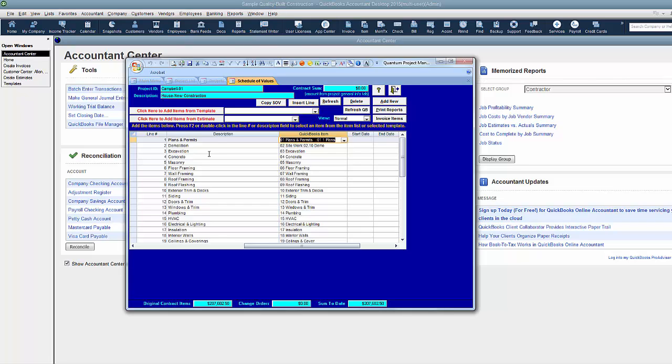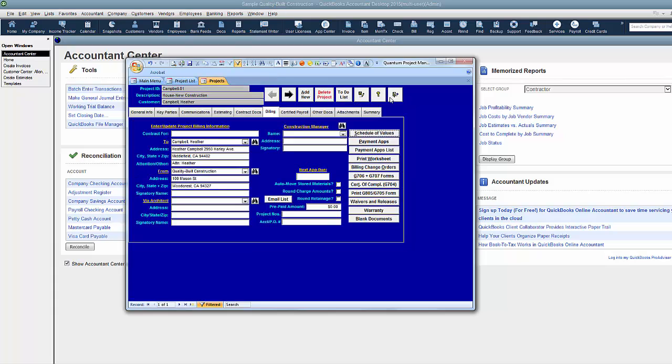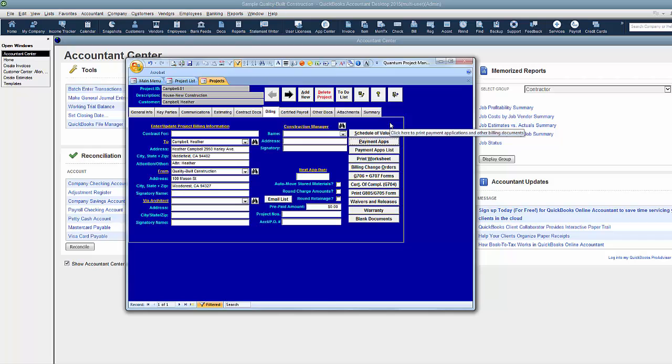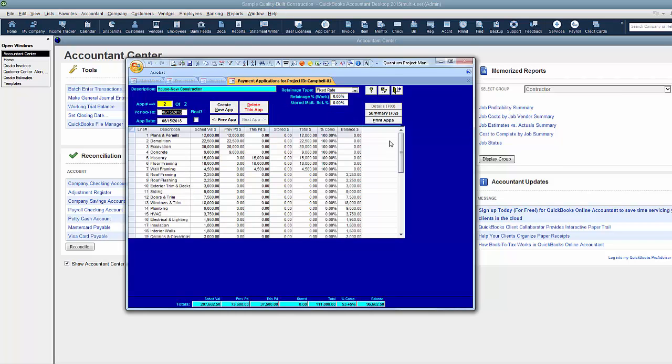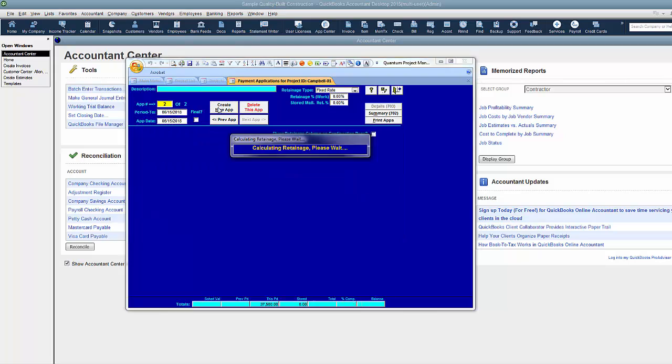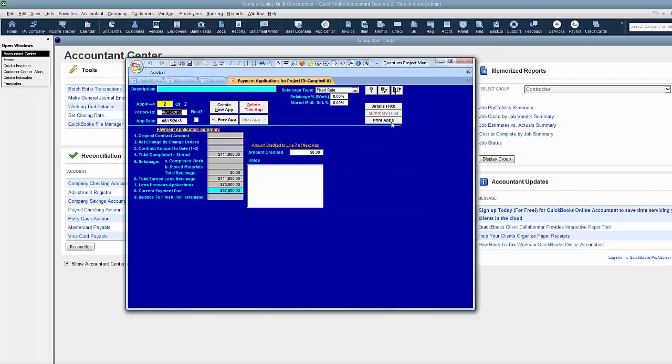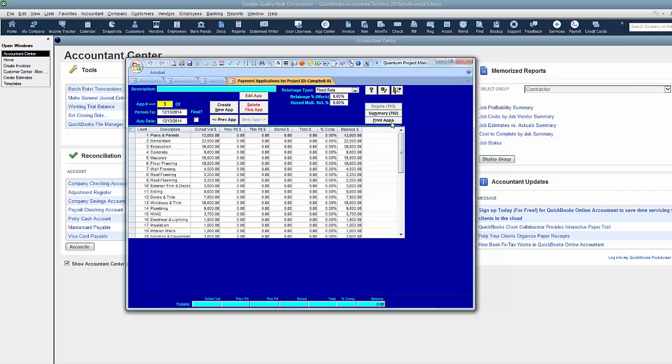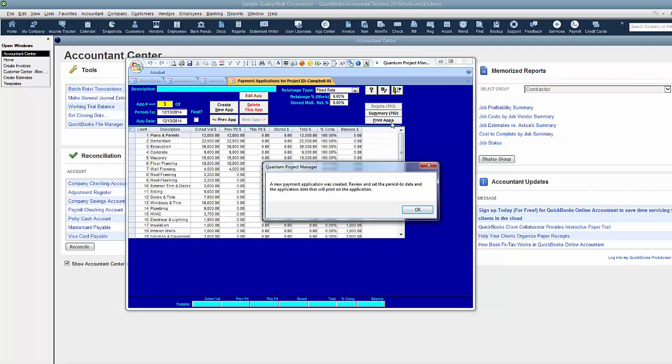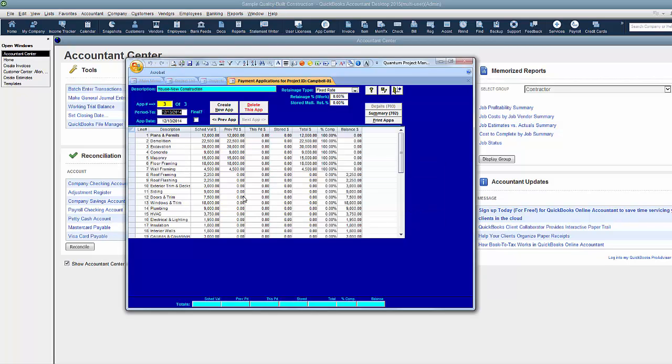Once your schedule of values is set up, back up here, you're ready to start creating your payment applications. And this is really where the strong point of Quantum Project Manager lies. So, let's go into the Payment Applications section. And as you can see, I've already got a couple of payment applications created for this particular project. So, let's create a new one. So, we're going to create a new application. It wants to just confirm what the total amount of the previous applications were. Typically speaking, you should take the default on this because it should already be in Quantum. But in the event you have a new project that's part-way done when you start using Quantum, you can fill that information in here. I'm going to take the default because it pulled those from the last two payments. And as soon as I do that, it automatically pulls in my schedule of values. It automatically identifies everything that's been previously paid.